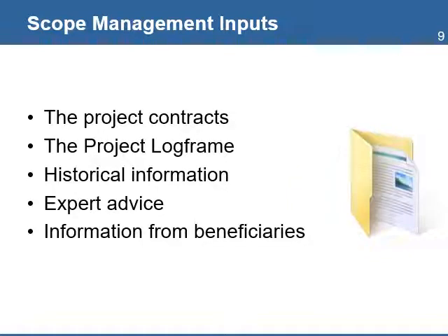The 4 steps require the following inputs: the project contract or agreement between the contracting organization and the donor, which includes the general purpose and goal of the project, as well as the restrictions imposed by the donor. The project log frame that describes the project objectives and indicators to track progress. Historical information from similar projects and lessons learned, expert advice from subject matter experts on specific technical areas of the project, and finally, information from project beneficiaries.